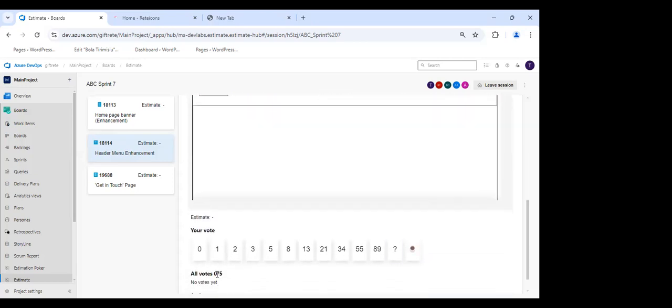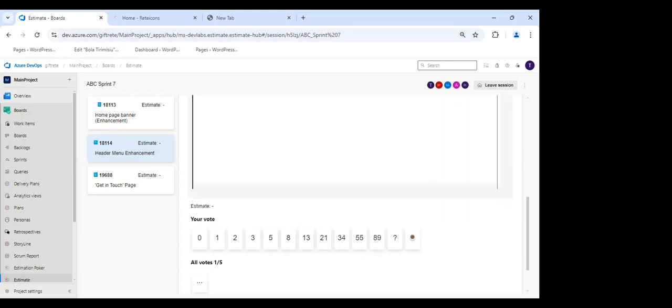if you're on the board, please, I would like you to vote. So we're using the Fibonacci scale, so you can see the different numbers for you to estimate what you think the effort will be, number one, obviously for the developers to develop this PBI, and for testing purposes, how much you think the effort will be for testing. So I can see we've got one vote so far.